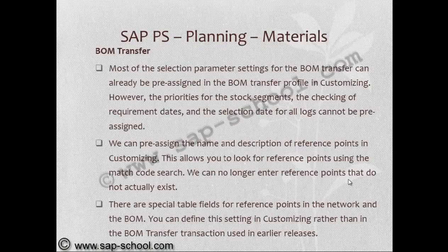Most of the selection parameter settings for the BOM transfer can already be pre-assigned in the BOM transfer profile in customizing. However, the priorities for the stock segments, the checking of requirement dates, and the selection date for all logs can be pre-assigned.